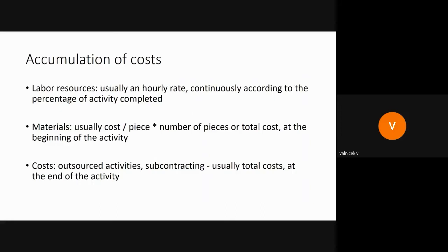The flat rate means that you calculate all your direct costs and you add the flat rate. In your project, I think the flat rate is 15%. So you will calculate all your direct costs. Let's say that your direct costs will be 1 million crowns within the 3 years. So the flat rate will be 150,000 crowns.